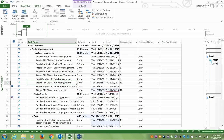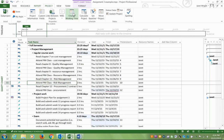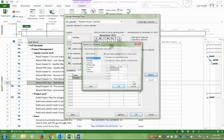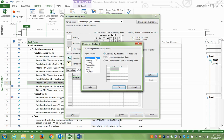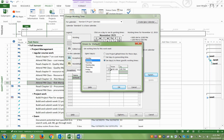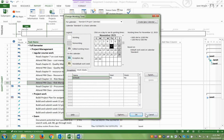In terms of the actual time that you're available, everyone has different working times. The default work week is going to be eight hours a day, and it assumes Monday to Friday. Maybe that's not really your schedule. So you can go in here, for example, maybe you do put in a few hours Sunday afternoon. On Sundays, I'm available to work from 2 to 4 p.m. I put in a couple hours on Sundays, and Mondays, maybe I only work 10 to 1. I attend a class, and then I have a part-time job, so I don't have time for school those days. And you can go through each day of the week and set these.